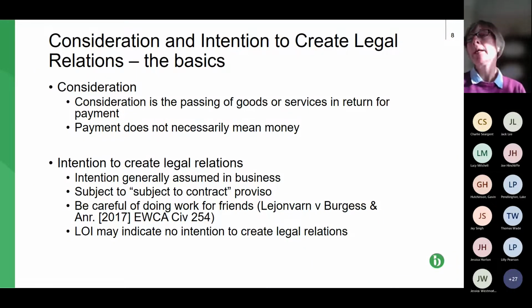You've had an offer and it's been accepted unconditionally. But if that conversation is specifically stated as being subject to contract, then it doesn't matter what we discuss in this call, the contract only applies. There's only a contract between the parties once what we agree in the call is reflected in the paperwork and both parties have signed it.